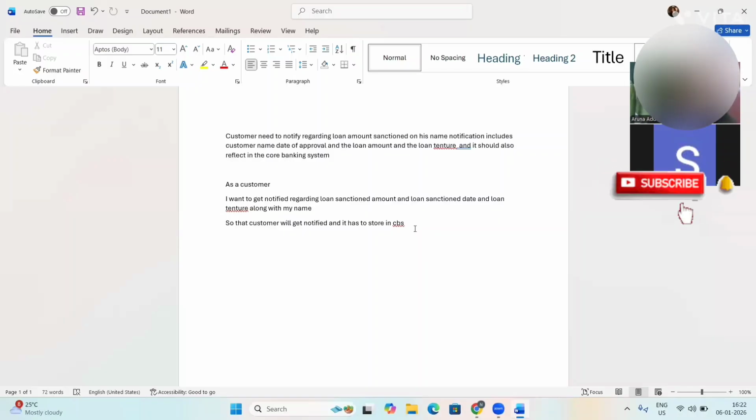Okay. Usually prioritization means we have to give importance. We have to choose which requirements or features are more important than anything else. Based on that, we prioritize the requirements based on the business needs and sometimes based on the customers' needs. And we have to consider cost and effort as well as risk and everything. For that, we apply techniques like MoSCoW. The abbreviation of MoSCoW is must have, should have, could have, or won't have. And sometimes we use the Kanban technique also in rare cases.